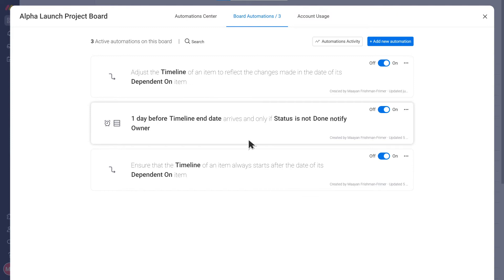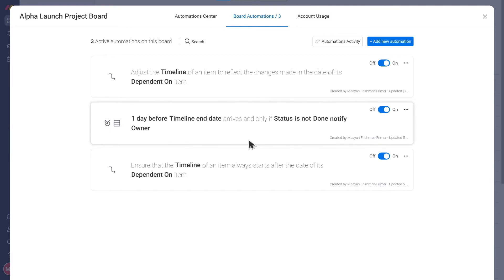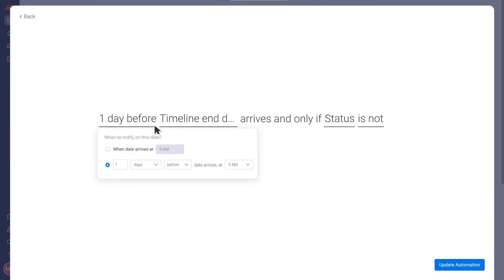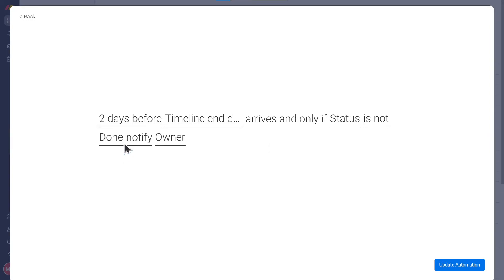Patricia, I see the template already has another automation to notify the task owner one day before the task is due in case it's not done. Do you want to keep this one? Sure, but let's change it to notify them two days before to give them a bit more time.